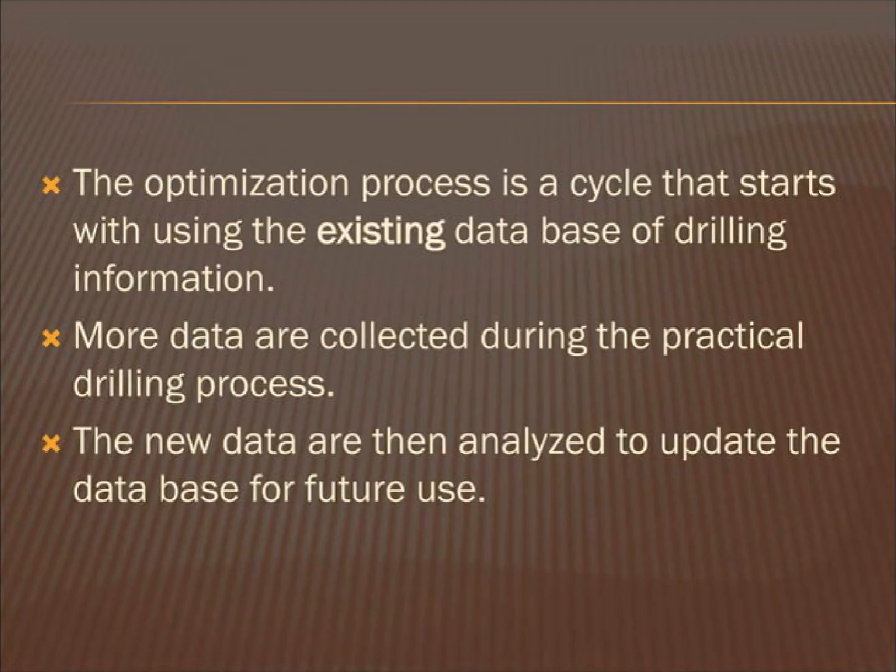Using an existing database of drilling information, costs can be predicted for well location, depth, fixed, daily and unit costs, as well as AFEs that break down costs into preparation, drilling, testing and completion. During the actual drilling process, additional data is collected and then analyzed to update the database for future use, thus creating a cycle that can be repeated for optimization of costs and other factors.